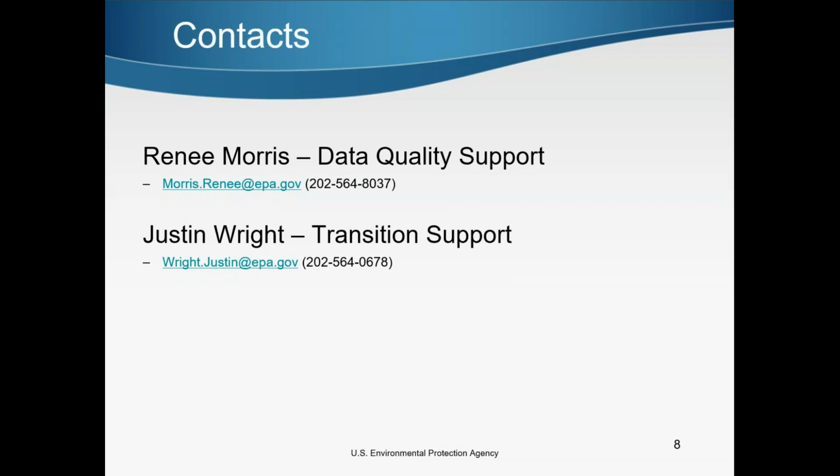Yes. And then immediately shut off the state one right after that final pull, or will it be taken offline before that process starts? I wouldn't shut off the state system until you're ready to completely be in Prime. So before your final, we're switching off the state system and moving to Prime, then we do another final submittal. What they just mentioned is we lock the users out. The states can lock the users out so that you don't have a day of data being added. Yeah, absolutely.